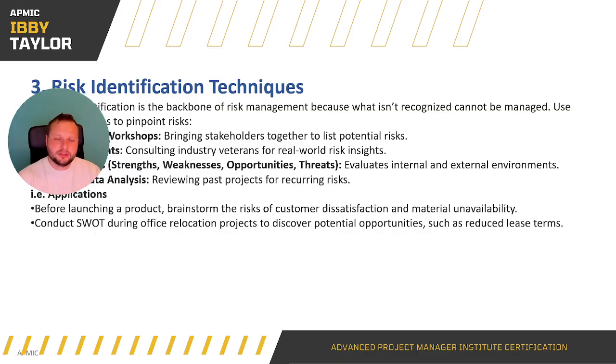So you've got a few identification techniques here. Brainstorming workshops: bringing stakeholders together to list potential risks. That can also mean bringing in internal resource, especially if there are people internally that have run similar projects before. It's going to be invaluable to get their lessons learned from previous projects. That is huge. Expert judgment also comes into that: consulting industry veterans for real-world risk insights. And again, it's their lessons learned from their previous deliveries, which you can then learn from to understand risks that you might have missed.